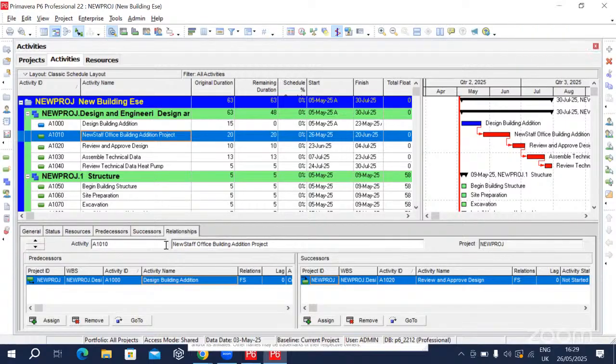If you look at the bottom, where you have the finish to start relationship, there's a column there which says relations. Can you see that column? It says finish to start. If you click in there, click on start to start. Right, now schedule again.